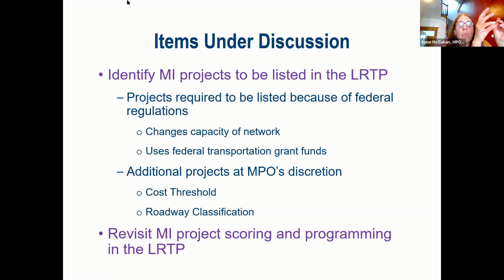And then when we redo the plan every 4 years, let's look at the projects that are in the plan. Are they moving forward, or are they just sitting here? Or do we keep pushing them into another year? And if there really isn't any design or work being done on it, then potentially put it back in the universe. It will always remain in the universe, but it may not be ready to be included in the LRTP. So those are the major issues that we'll be discussing. Thanks, Anna. John McQueen.